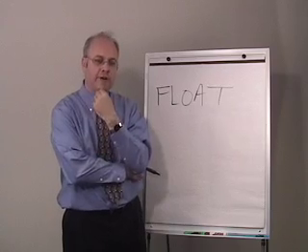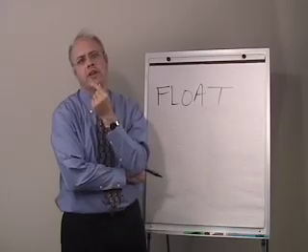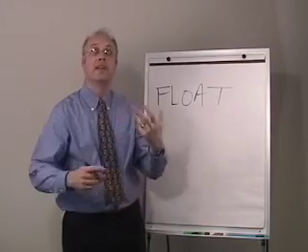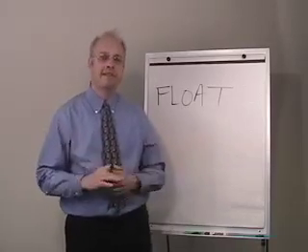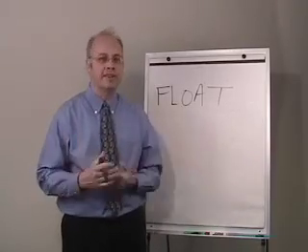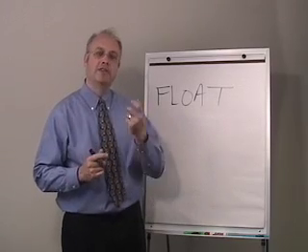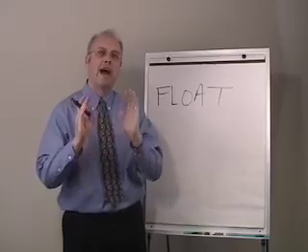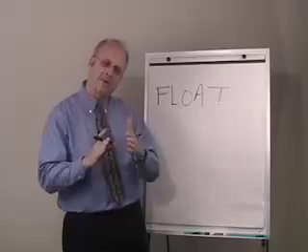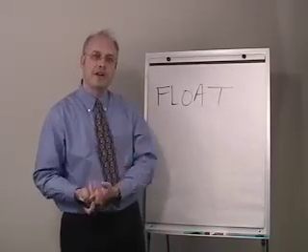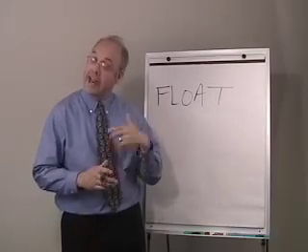So, for example, if I had a contract that was silent as to who owns float, then the question would become, what's the, for lack of a better expression, industry standard or normal legal practice, or legal precedent as it relates to that subject? Typically, float is considered to be owned by the contract, not contractor, not owner, but the contract, meaning it belongs to the project, and it's available to all parties to the contract on an as-needed basis.